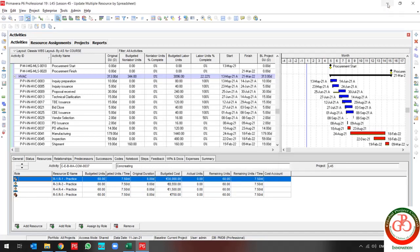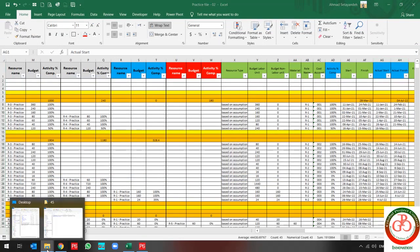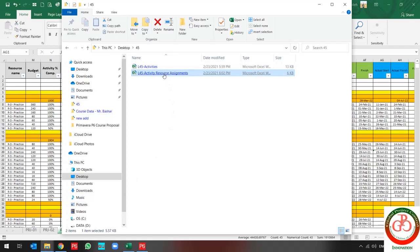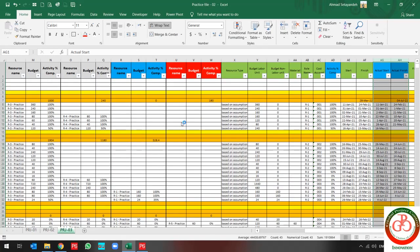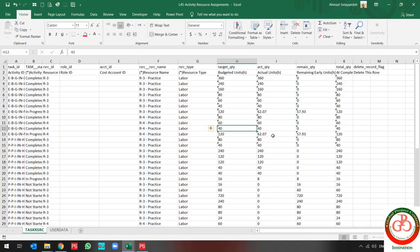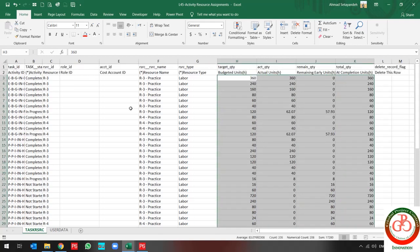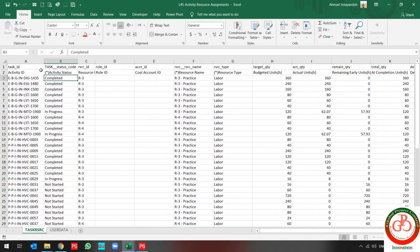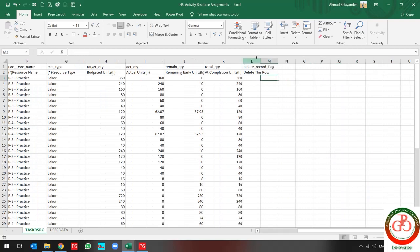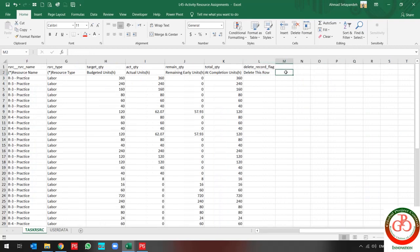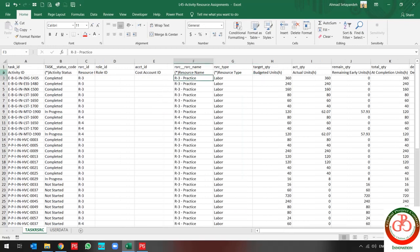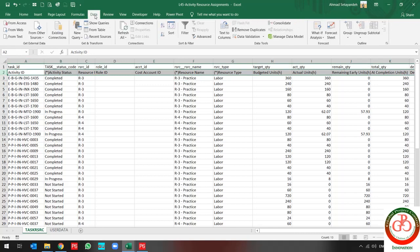Now I minimize P6 and go through the update for resource assignment. Each time you create the export file, you need to convert the text to numbers. Because I have some updates in some of my activities, I need to look up my progress at the end of this file. I write a percentage here and go through the update based on resources.